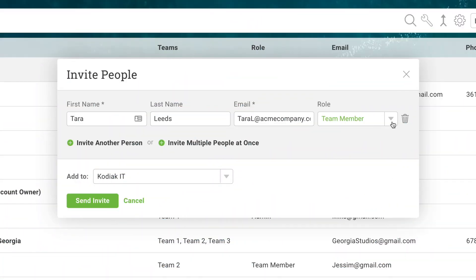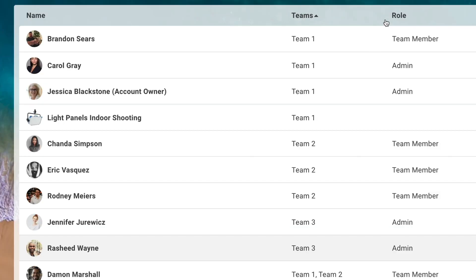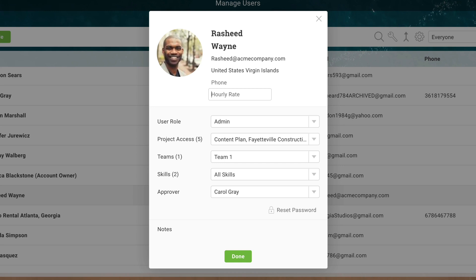First, onboard your resources into the software. Invite people, set roles, and organize them into teams. Set labor costs for team members so the software can automatically track costs as they log hours, regardless of what project tool they're working from.